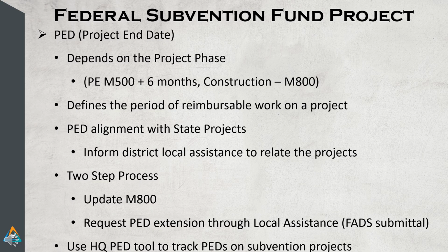Funding will be updated before construction and after construction. If you compare the PED date to the project management milestones, M500 plus 6 months marks the PED date. So let's say you have a subvention project and you're creating a schedule for the project. You have to make sure that you continue charging to this project, but only until the PED date. If you pass the PED and then you charge, your expenses become non-reimbursable. Then you're probably asked to reverse your timesheets.